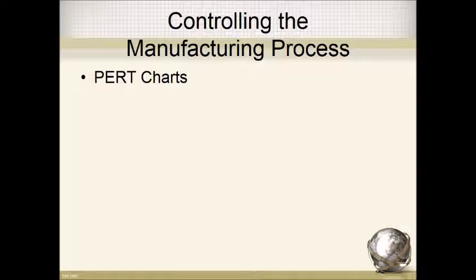The critical path is a very important part, and it's called critical because it's the series of tasks that take the longest to complete, and the term critical is used because any delay anywhere along the critical path could cause a project to be late. It's very interesting if you look at a PERT chart or a Gantt chart, how you'd be able to utilize either one with a school project, if you're working in a team or a group, to make sure that you're making the best use of your resources and the best amount of time in order to complete the task the most effectively and the most efficiently.